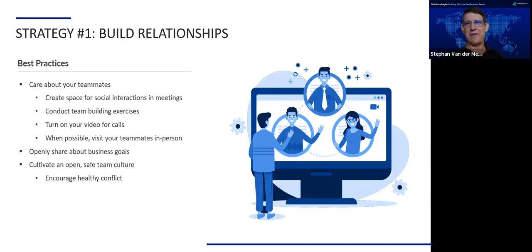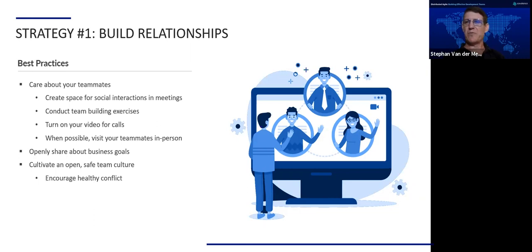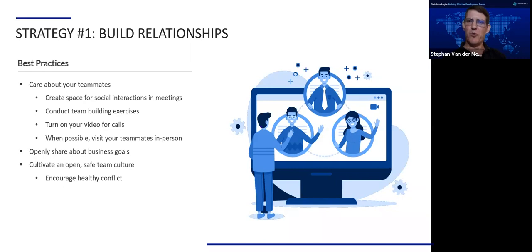Some best practices we found for building relationships: first, we need to care about our teammates. It's good to be very intentional about creating space for relationships to form. We make space in our meetings — maybe the first five minutes — for social interaction: talking about family, hobbies, what's happening in your life, the game that happened on Saturday. We also bring in icebreakers from time to time — for instance, a blog post for each person on the team to share their hobbies. Especially at the beginning of a new product team, it's important to get a little more time to get to know each other personally.